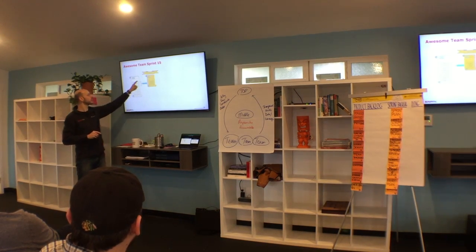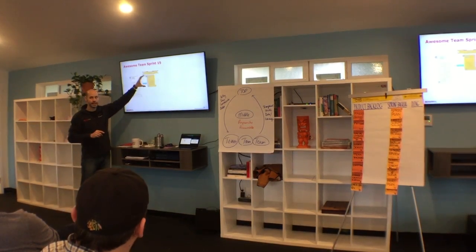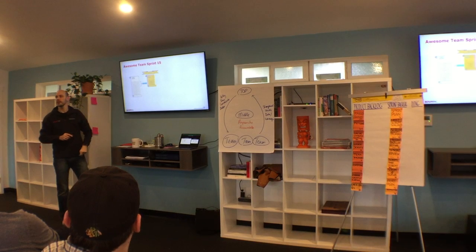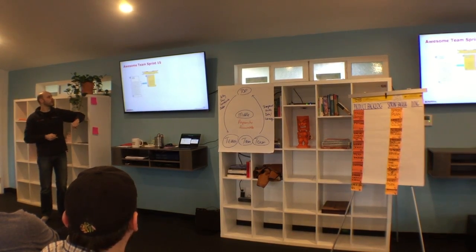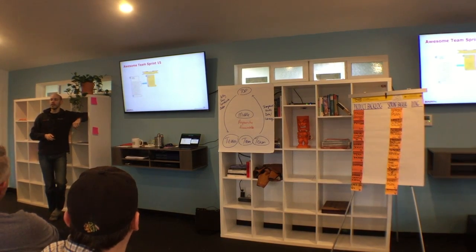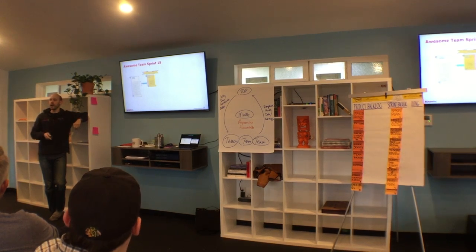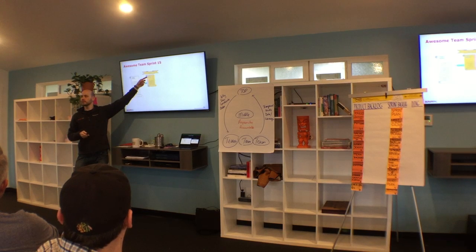And because that's discovered by making trade-offs between these two backlogs, keeping it the same size within yesterday's weather, the team is involved in the conversation about the sprint goal even though the product owner owns it. From the moment the team agrees to the sprint goal, the team now owns the sprint backlog and they can change it any time whether or not the product owner wants them to. What they're able to do now is achieve commander's intent, which has been made explicit in the sprint goal.